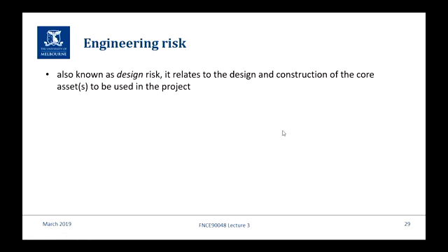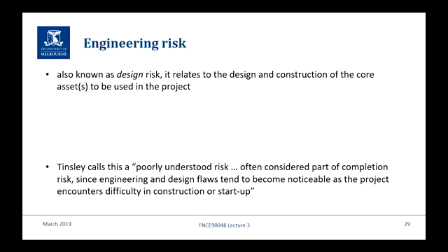So engineering risk relates to the design and construction of the asset and the whole asset facility. And the reason I keep putting up slides to show you the complexity, and we went through the oil operations project, is there's a lot of scope for making engineering or design errors in a lot of these things. So you have to be very careful in relation to the engineering. And how can you be careful if you're an SPV and you have no expertise in engineering design? Well, you have to mitigate the risk somehow, and we'll talk about mitigation next week.